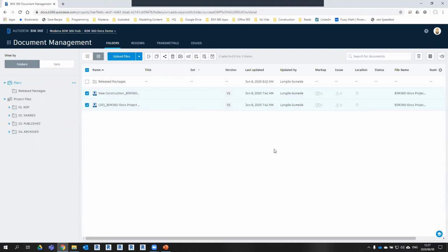If it's approved, it'll continue on the process, meaning it'll either carry on to the next design person to be approved, or be copied to a new folder, so the approval process will come to completion. If one of those files isn't approved, it will be rejected and it will need to be fixed up before you can submit it for approval again. There are a few settings behind that, and ideally that's how we'll assist you with the setup and process going forward.